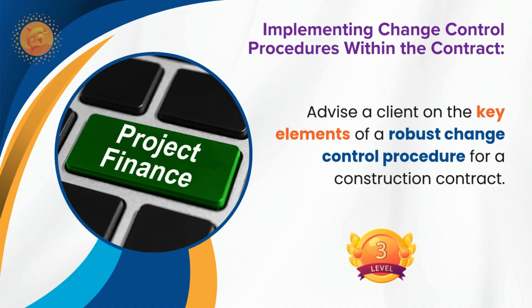That means you are going to remove the entire execution and then you have to work on it again. So that is the purpose you want to have this. And again, whenever we have a change order, it should go to the responsible person. Like if it is structural, it should go to the structural engineer, that department. So we should have something like a RACI matrix: responsible, accountable, consulted, informed.